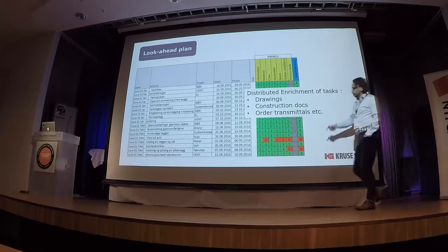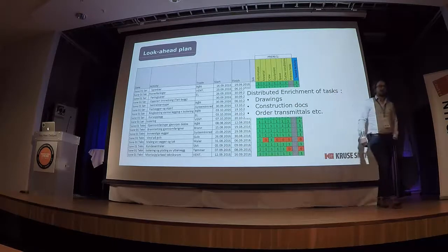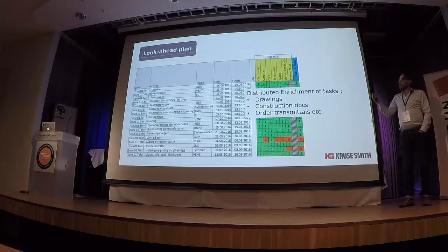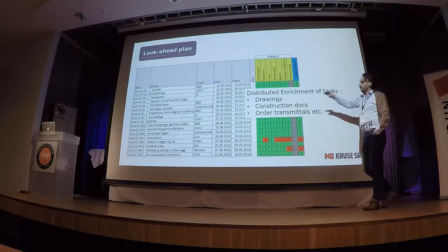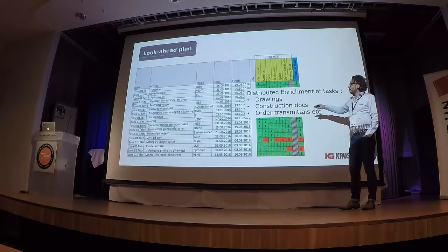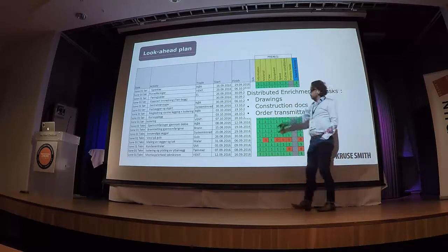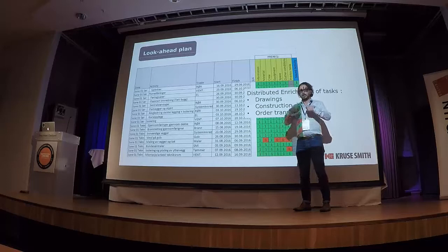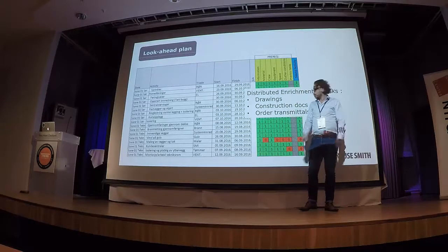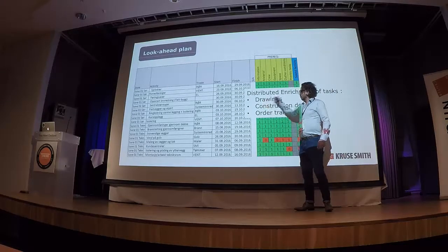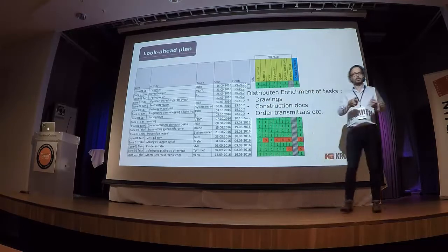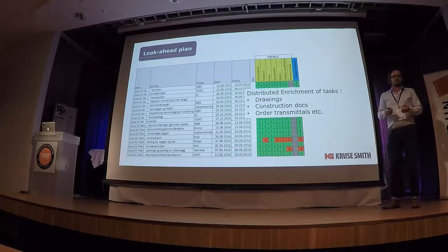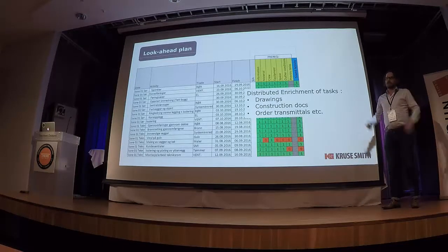So if you're missing one of the constraints, you are not a sound activity. We would love to have this in our planning system where we can work on the constraint directly, and maybe instead of just collaborating and talking about the process, we could also say that to have the drawings in, you really have to attach the drawings to the activity. And that changes the state of the constraint, maybe.